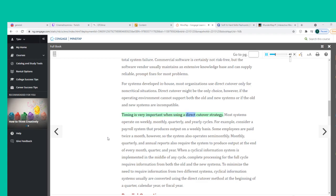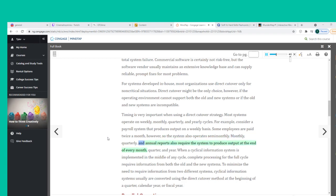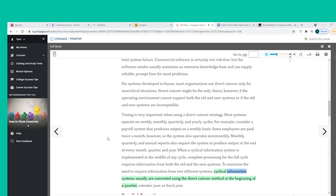Timing is very important when using a direct cutover strategy. Most systems operate on weekly, monthly, quarterly, and yearly cycles. For example, consider a payroll system that produces output on a weekly basis — some employees are paid semi-monthly, so the system also operates semi-monthly. When a cyclical information system is implemented in the middle of any cycle, complete processing requires information from both the old and new systems. To minimize this, cyclical systems are usually converted using direct cutover at the beginning of a quarter, calendar year, or fiscal year.